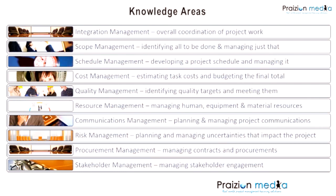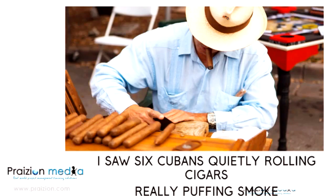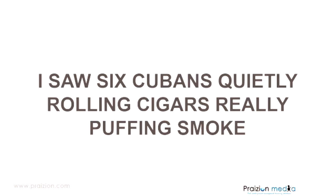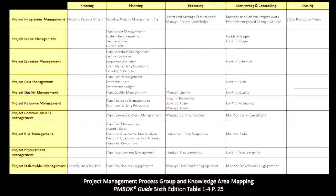So if you take a look at the screen, it shows you that if you slice project management by process group and you slice it by knowledge area, you get intersections. And those intersections are processes. There are 49 processes of project management, and these 49 processes are used to do different things.